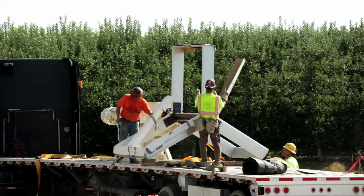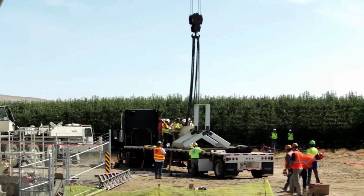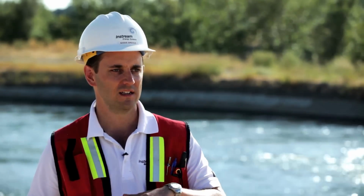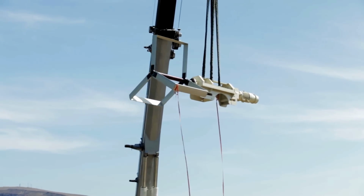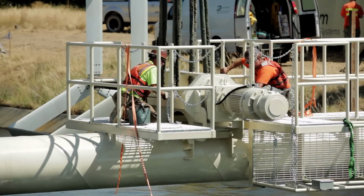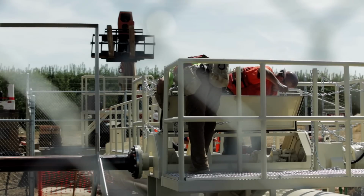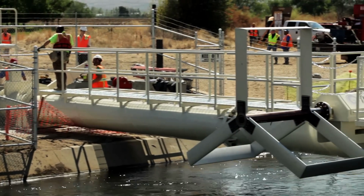The turbine was assembled off-site, is ready to go, so we have control over how things are put together in a clean, controlled environment. And then that unit is swung out over the canal to a point where it's ready to mate with pre-existing brackets on the support structure. Then the turbine is bolted down and in place and ready. Then the electrical connections can be run, so electrical power run through conduit that's ready to go from our power conversion system onshore and tied into the generator. Really, that's the extent of an installation day.